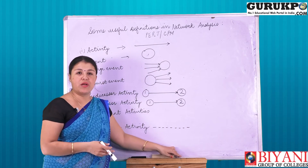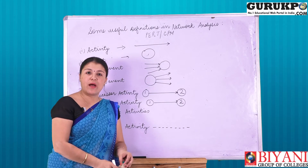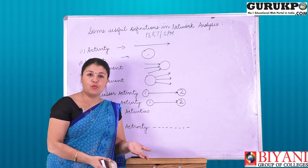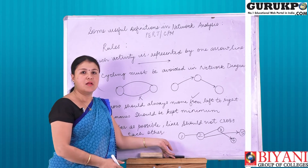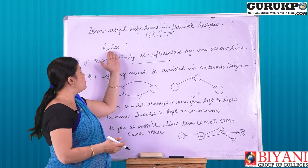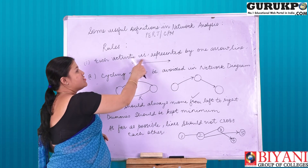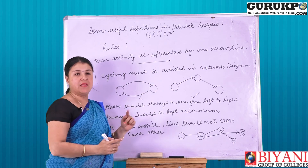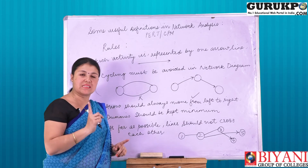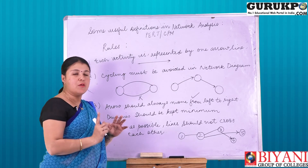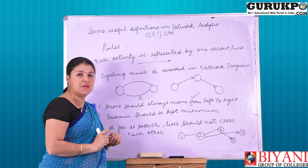Now, some more important points in connection with PERT and CPM that are required to be known — the rules. The first rule is: each activity is represented by one arrow line. That is, we represent one activity by a single line. We cannot represent two activities indicating the same line.